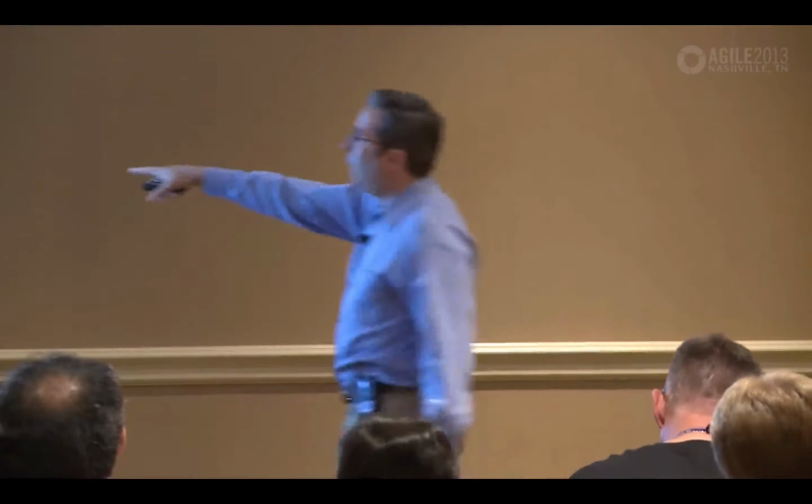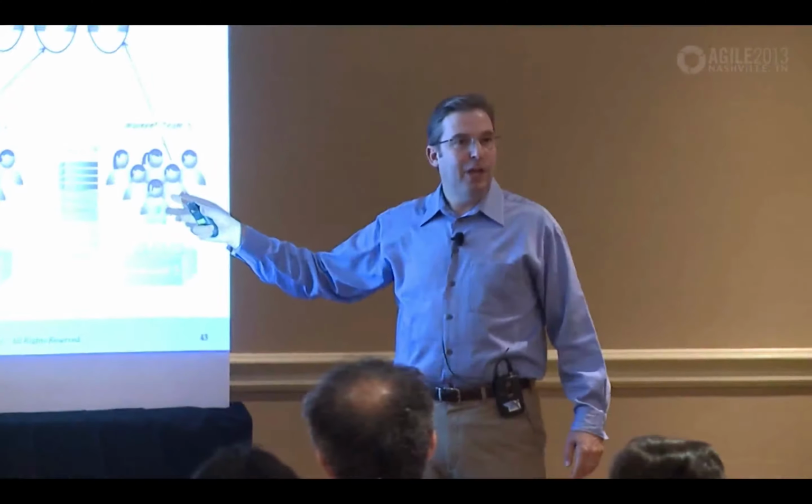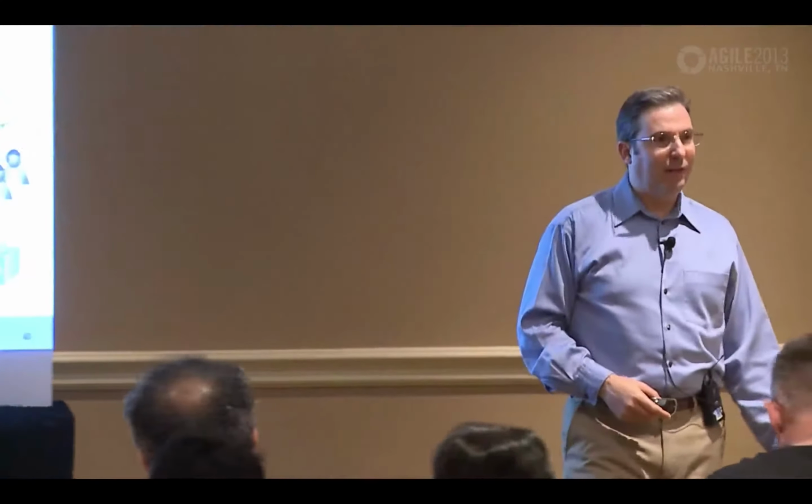Now, this model has some obvious deficiencies as well. Remember, there's no perfect solution. This model will break at scale, just like the other model will, but it'll break for a different reason, and it's a reason you can fix. It breaks in an obvious way, right? Let's say you had 4 people down here on component team 3, and you had 40 projects you were working on. You're not really going to do that, are you? Assign each person out to 10 different teams? That'll violate our focused and committed part of our team description.